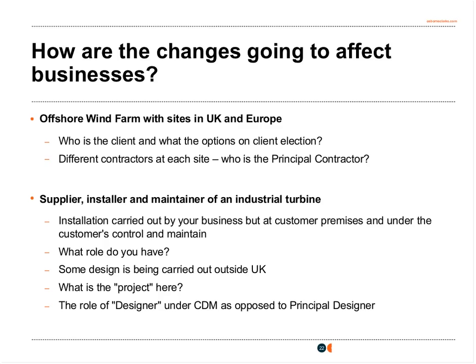It might be that you could break the wider project down into essentially smaller mini projects so that you have a principal contractor involved on each discrete part of the wider wind farm project at any one time. All of this should be borne in mind with the primary obligations of CDM 2015, that one party should have control over the construction phase to ensure that health and safety risks are mitigated.